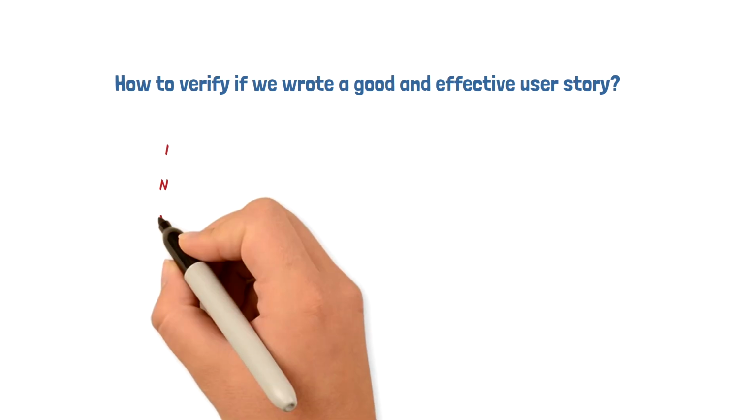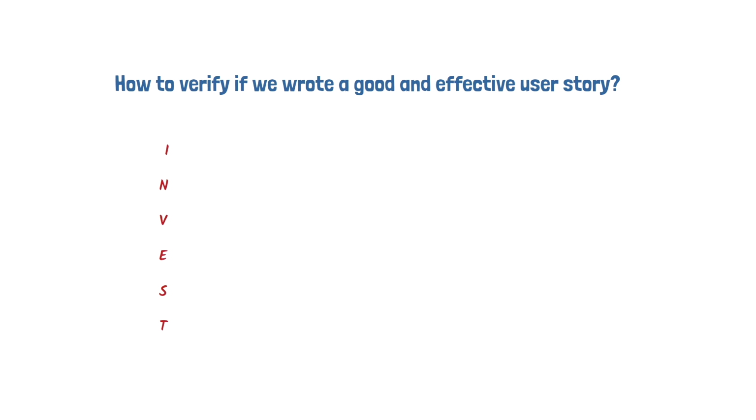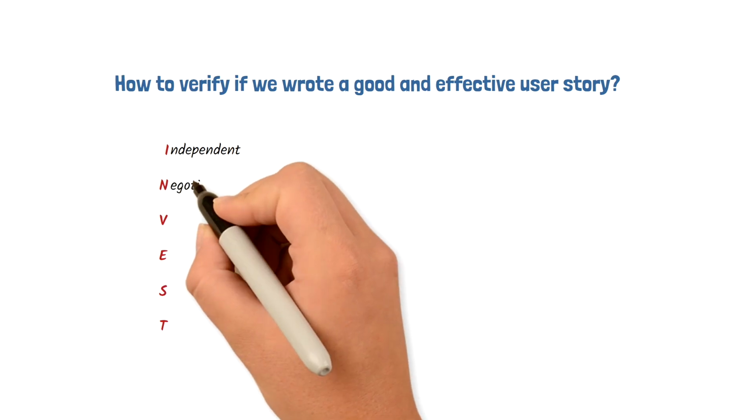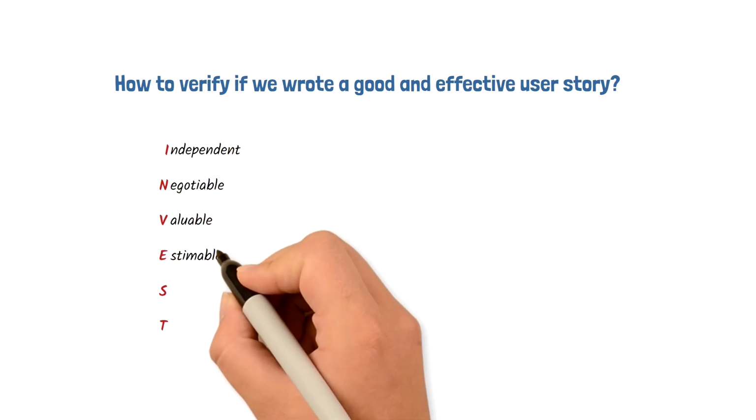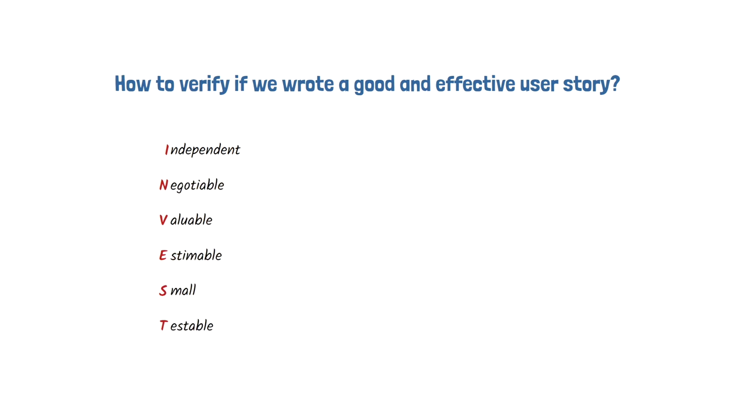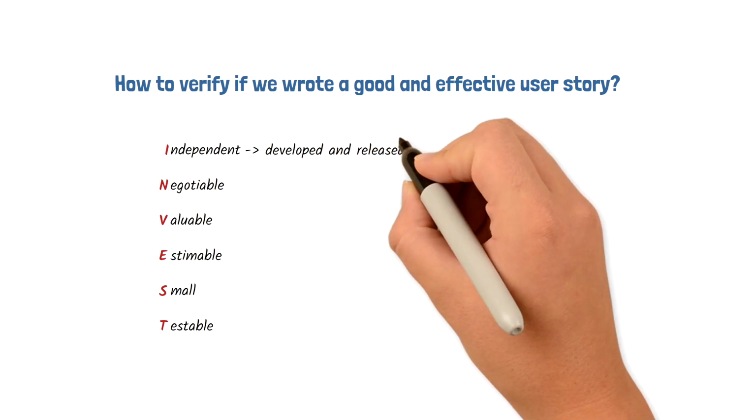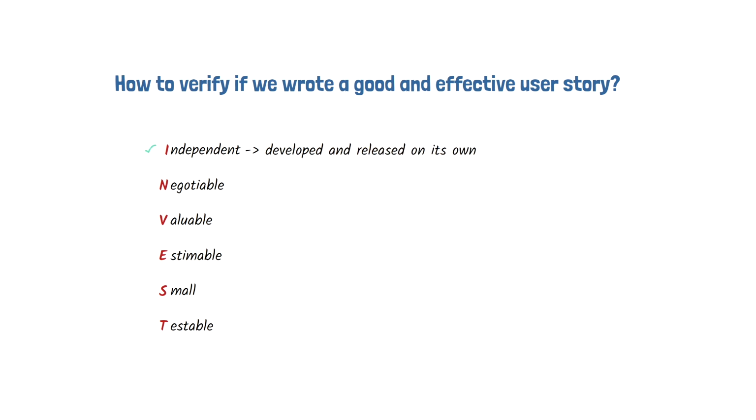This is done with the help of the acronym INVEST. INVEST means independent, negotiable, valuable, estimatable, small, and testable. Let's take a look at independent. A story that is independent is not coupled to any other story. It can be developed in any order and can be released on its own.